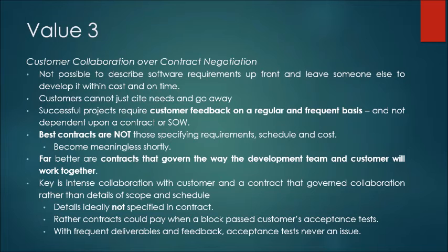I can quote my own example here. We started with an e-commerce project. We had a 43-page functional requirement specification document. Everything appeared so final, so fixed, that nothing was going to change. Based on that, we estimated the project to be n number of hours, and we quoted the cost accordingly. But we kept our room open that this cost is based on these needs. If the needs change, the cost will change.